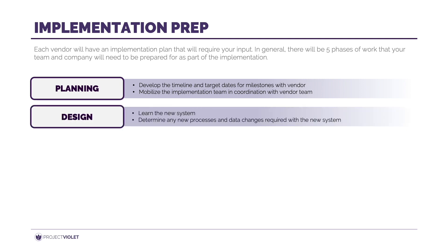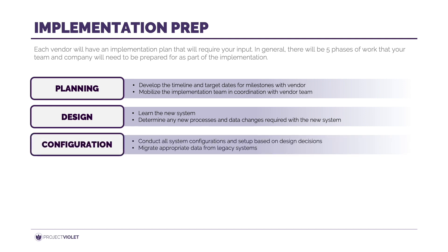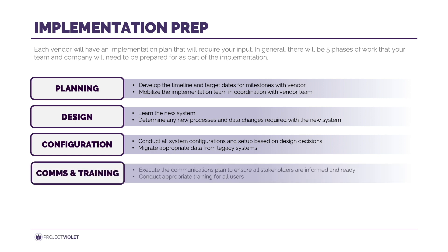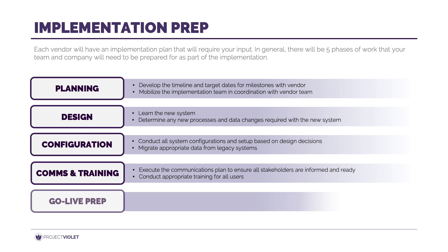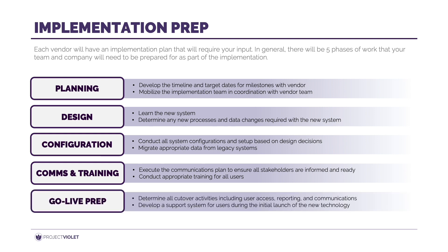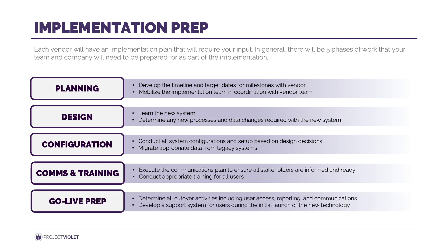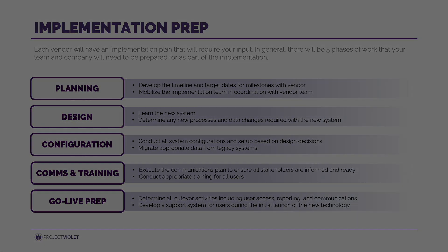Implementation work includes design — learning the system and determining what the future state looks like with the new technology — configuration, where you or the vendor set up the system based on your design decisions, communications and training across your company, and finally go-live prep, making sure everything is in place and you have a support system for the initial launch.